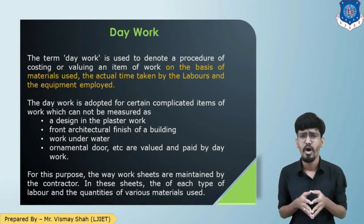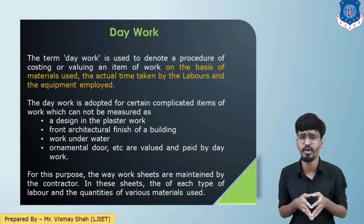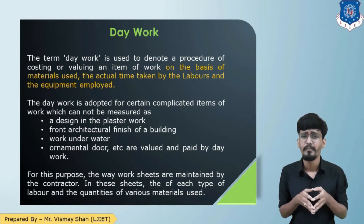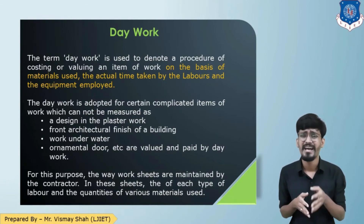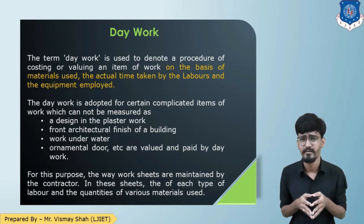The term day work is used to denote a procedure for costing or valuing an item of work on the basis of material used, actual labor engaged, and equipment employed for the completion of the work. Day work is adopted for certain items of work which cannot be included under certain heads, such as designing of plasterwork, front architectural finish of the building, underwater work, or construction of an ornamental door. For this purpose, day worksheets are prepared and maintained by the contractor stating the material used, time taken by laborers, types of labor, and equipment used. These sheets are checked and verified by the owner or client.